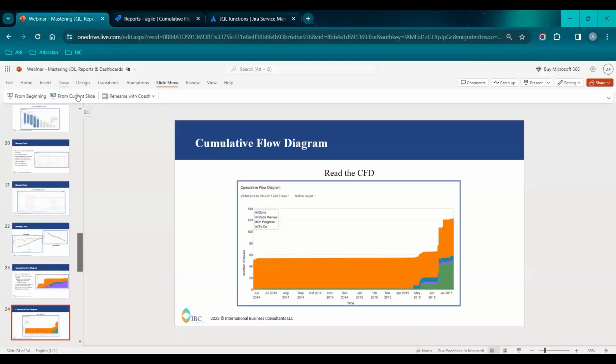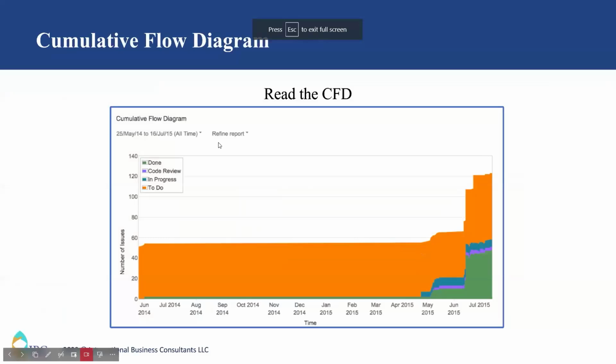So now let's see in this slide how we can read the cumulative flow diagram. In this cumulative flow diagram, they have given a specific time range, showing a different year format: 2014 and 2015. This is the time frame on the x-axis. On July 14, 2014, the team planned to complete 40 or nearly 50 story points. There is no scope change at first, but by May 2015 there is a little scope change, committing to nearly 65 or 60 story points.